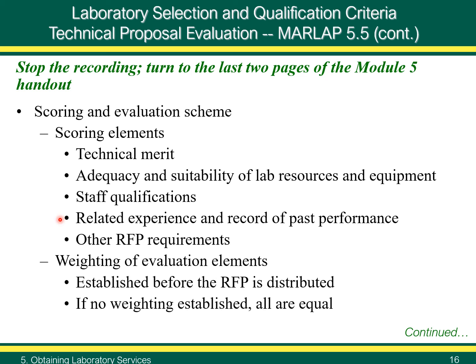Related experience and record of past performance. The RFP should require the laboratory to furnish references in relation to its past or present work. Other RFP requirements. The laboratory's proposal should outline the various programs and commitments, QA, safety, waste management, etc., as well as documentation of various certifications, licenses, and permits to ensure that the requirements of the RFP will be met.